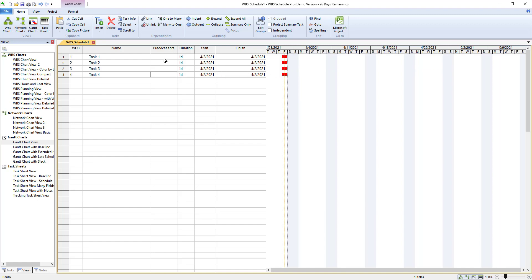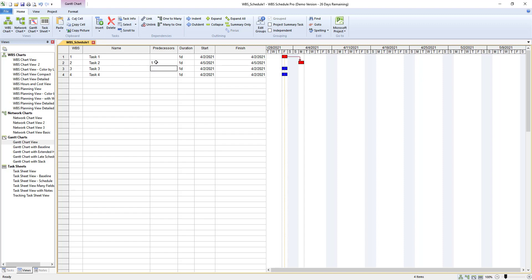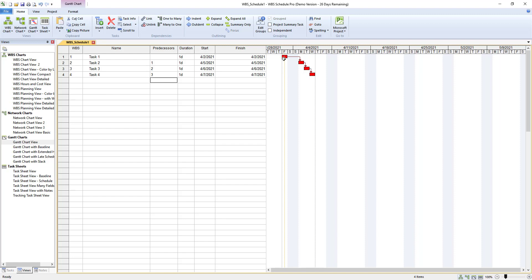What we want to do now is set predecessors. So here under predecessor we will type the numerical ID of the WBS. So since one is the kickoff it has no predecessor. So two we would put one since that is the predecessor. You'll notice that the Gantt chart has now changed. We want to do this for the next two tasks. So we will do two and three. Now we have a Gantt chart view that shows these tasks and the relation to one another.